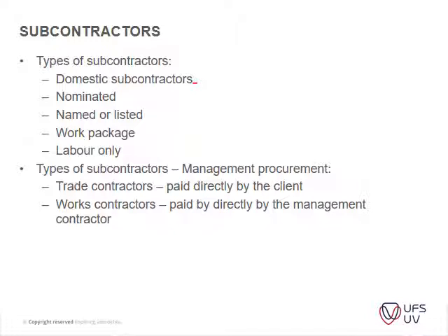For instance, your electrical contractor, your plumbing contractor, etc. The ones that form part of your company, whose health and safety file falls underneath your health and safety file, that type of thing. Okay, and then you've got your nominated subcontractors, usually with your provisional sums in your tender documents. A contractor is nominated, and together with the contractor, they're appointed.